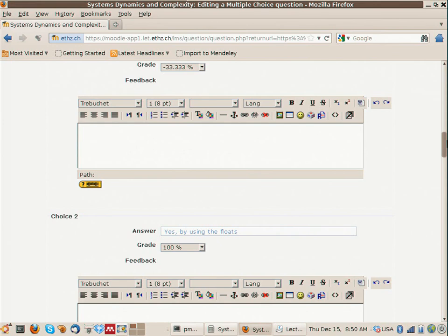The slight difference, which I didn't mention in the lecture, was that with this last thing, what was it called? PERT, yes. There you incorporate a certainty based more on empirical evidence. So you come up with this formula for how to calculate the time, based on optimistic, pessimistic, and whatever scenario, but it's kind of an empirical thing.